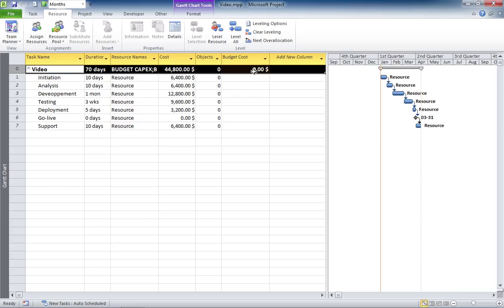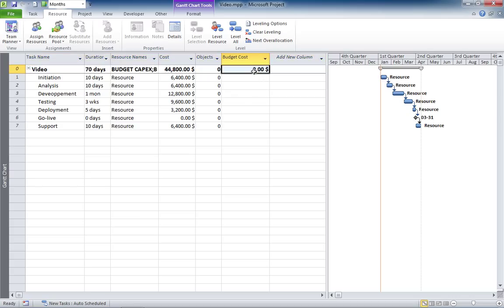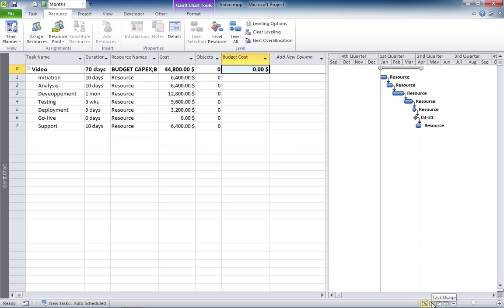Now, you see here this column, the budget cost. This is the compound budget for OPEX and CAPEX. It's a single cell and it's not editable, but you need to put a separate value for each budget. So, the way to do this, you need to go to the task usage sheet.